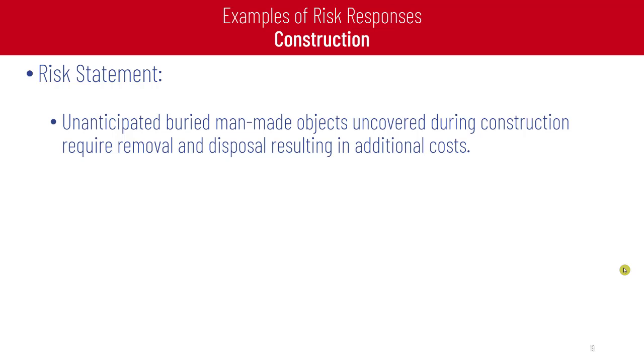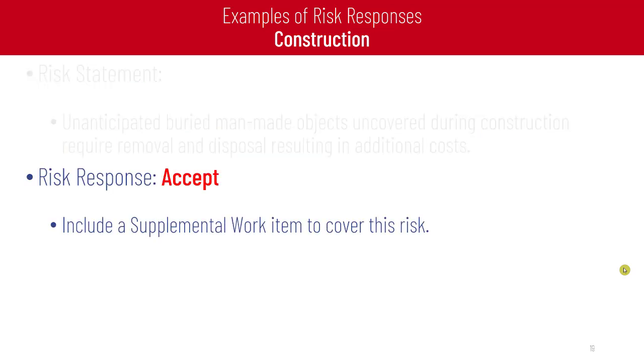The second example of risk response in the construction phase states that unanticipated buried man-made objects uncovered during construction require removal and disposal, resulting in additional cost. The recommended risk response is accept, meaning include a supplemental work item to cover this risk.